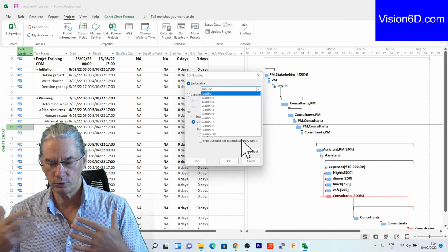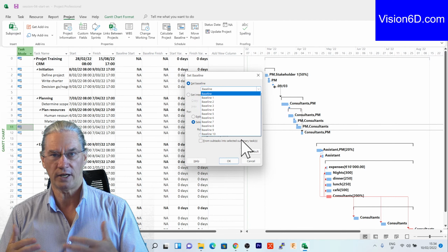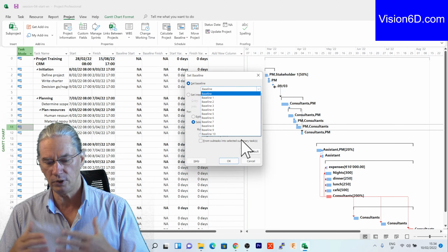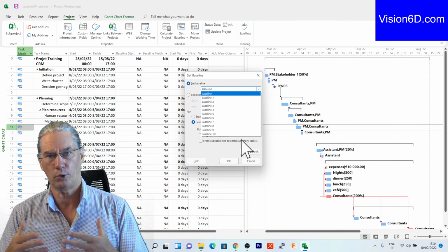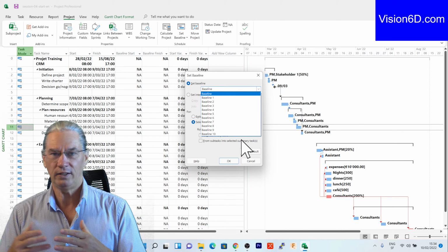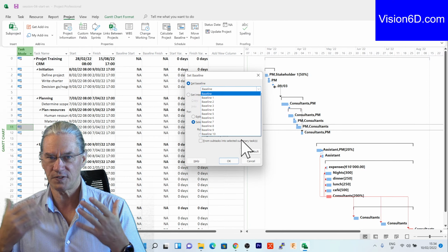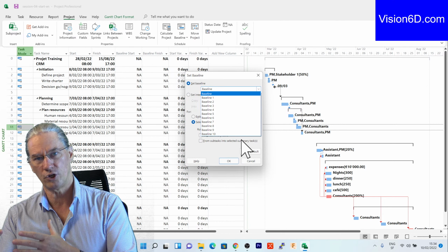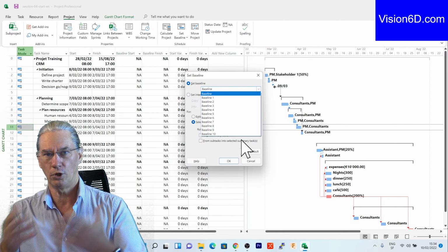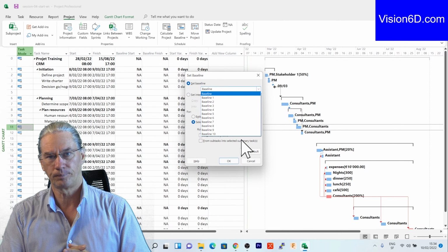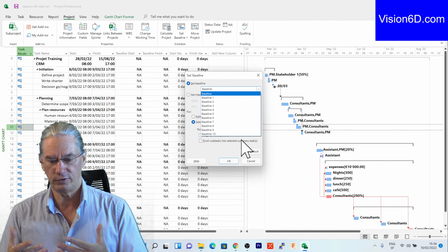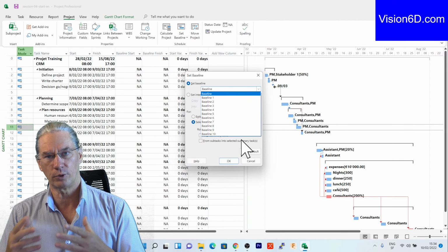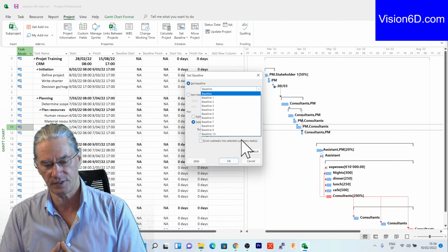And at a certain point you have discussions with the customers or with the board, and you see that you need to bring important changes into the project. So it doesn't make any more sense to compare the new project with its changes to the older baseline. So for that, you have the possibility to redo a baseline from a certain point in time.